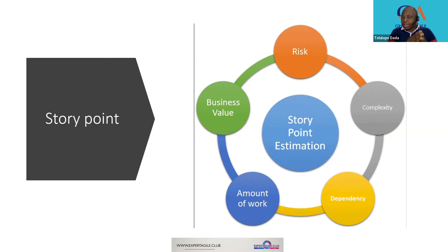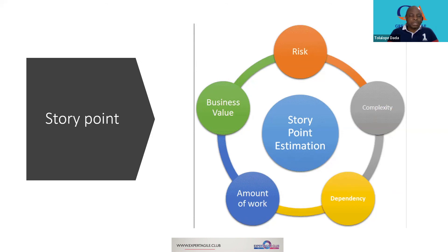When dependency is outside the team, we cannot control it, but within the team we can move things around. If an item depends on something outside to move forward, it automatically becomes high value in the current sprint. The amount of work is also relative — we may start thinking it's a certain amount, but as we explore it more will be needed, which is why assigning fixed hours may not be ideal. Finally, business value — what does the customer want? All of these factors and more are considered in arriving at story points.